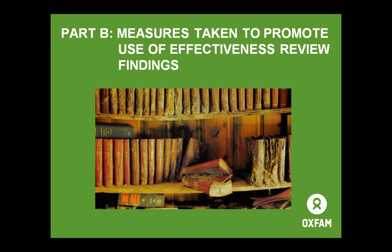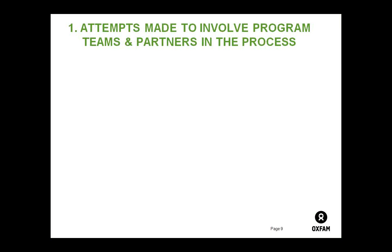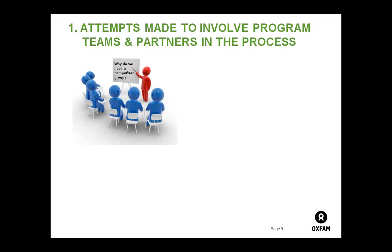Now I want to talk about what we've put in place to ensure use of the findings of these effectiveness reviews. We don't want them sitting on the shelf collecting dust. One of the key things, recognized in the evaluation use literature, is to make sure key people are involved in the process right from the start. So even though programs are randomly selected and have no choice to participate, we still try to involve program teams and partners in the whole process. This includes some light training and orientation on why we need a comparison group and different approaches to causal inference.